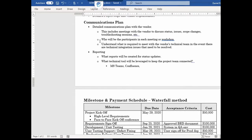In the communications plan, you want to detail this out with the vendor. It's going to include the schedule of meetings — status meetings, issue meetings, and one-off special meetings for scope changes. You may also have troubleshooting meetings, such as a vendor workshop between the technical teams of your organization and PMO Tools Inc. when there are integration issues. That would be the quickest way to resolve integration problems. But you have to define in the communications plan when these will occur, whether scheduled or one-offs, and what guarantees the vendor can provide that their resources will be available to help you troubleshoot.